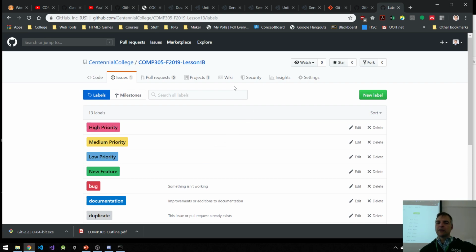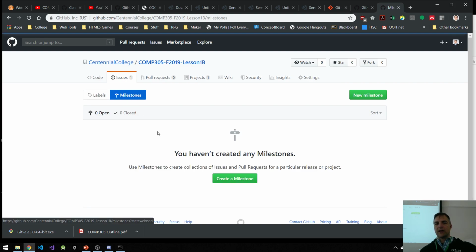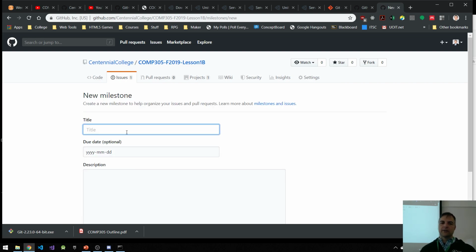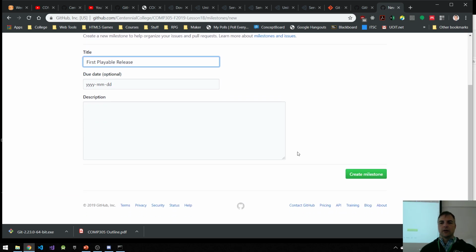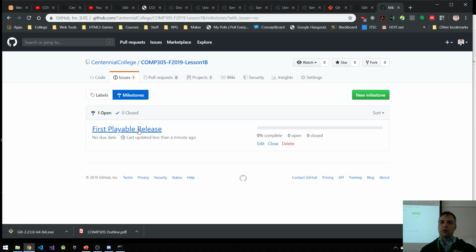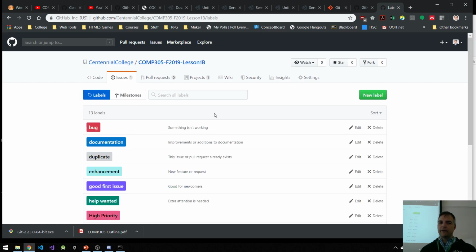The other thing I like to do is establish milestones. Milestones are like your releases. So here's milestones. I can make a new milestone. Let's just call this first playable release. There's a milestone, and I can make a due date if I want. I'm going to create that milestone. Okay, cool. So I've got a first playable release milestone and a bunch of labels, and now I've also got this project. Let's go back to the issues though.